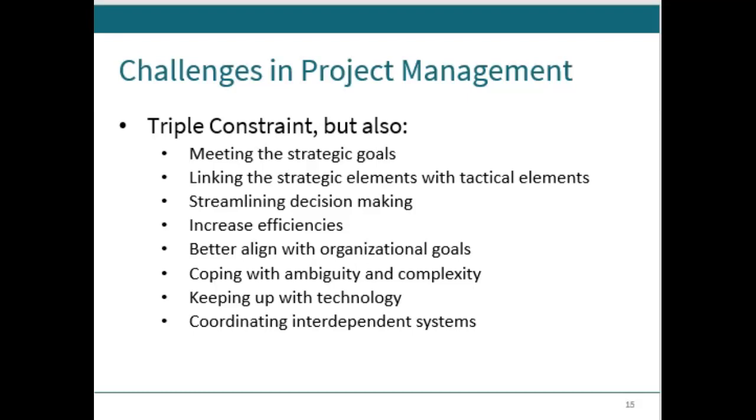I usually link my project to strategy through a document called the Requirements Traceability Matrix. I'm going to trace my requirements back to some overarching document. Might be a government law, might be the corporate strategy.